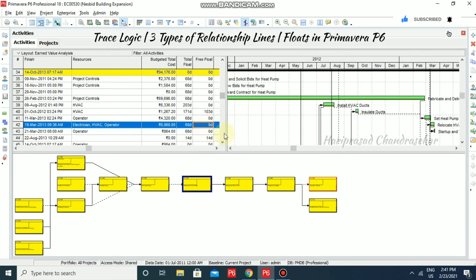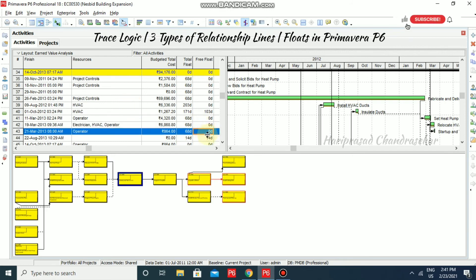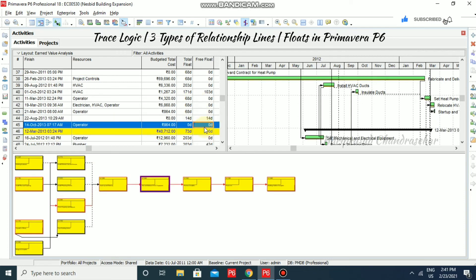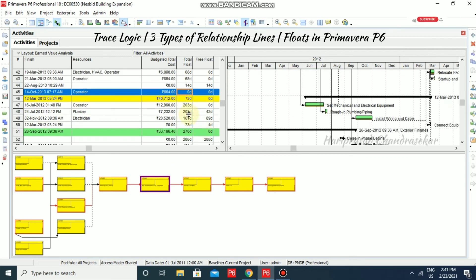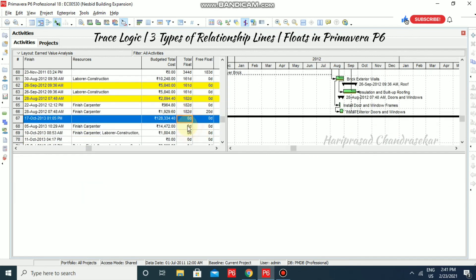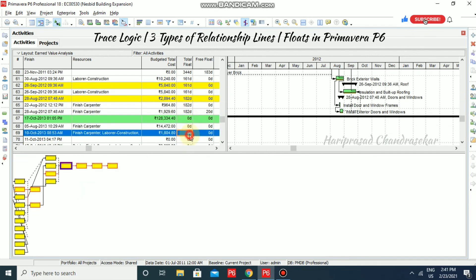Some activities also have both driving and non-driving relationships based on the assignments. It is on the critical path because it has a total float of zero. These are all the activities with total float zero, shown with red color solid lines.